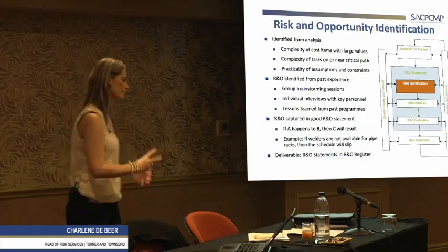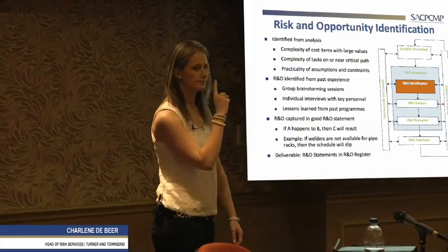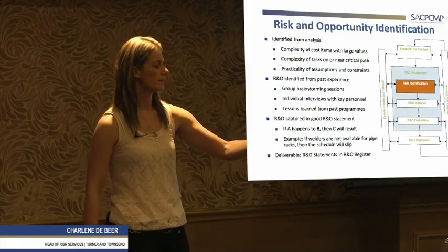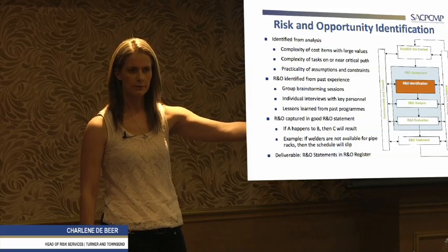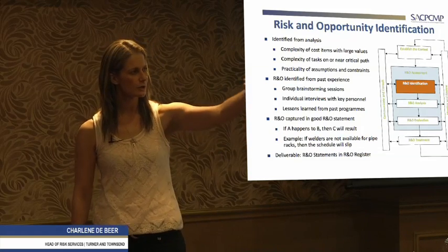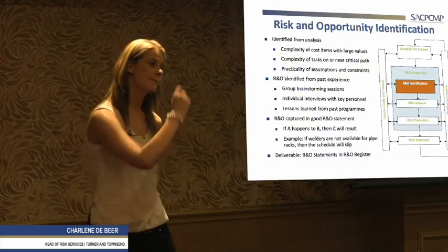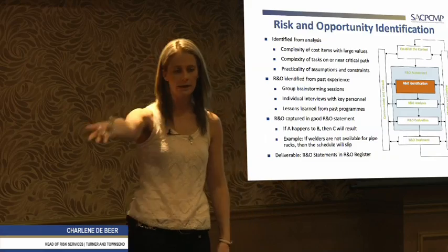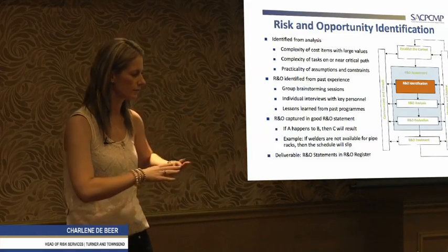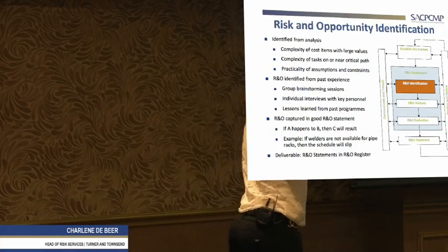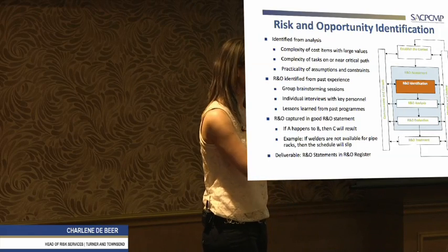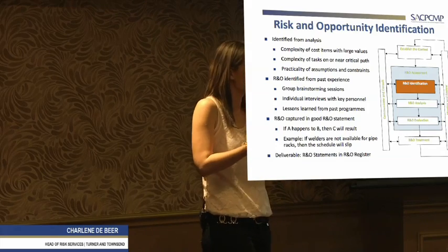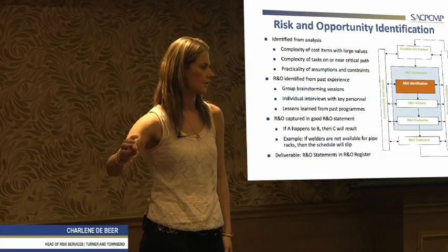So if a risk would happen, it could affect more than one area. There might be an engineering change. Engineering is affected. The engineering change will knock on something in construction, something specific. Will it be civils, mechanical, piping, electrical instruments, whatever? Then if it knocks on, does it mean we have to do procurement of that material? Like whatever the knock-on is. Do we have spares? Must we go procure? So procurement might be affected, the cost thereof.